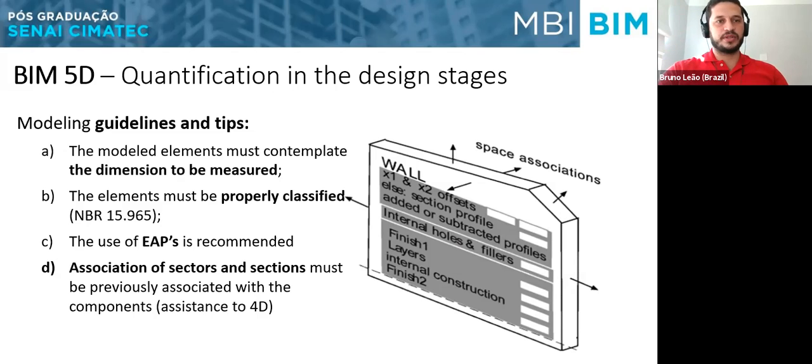It's a national rule that we can follow to do this kind of classification. The use of EAPs, actually WBS, is recommended, so we can link our model elements with the budgets, the cost estimation, or the unitary cost, sorry, or the schedule of the construction.